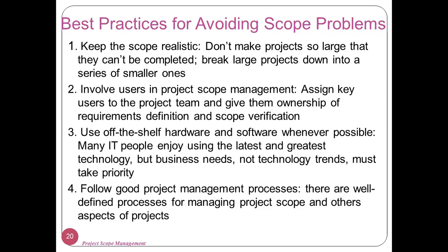What is scope verification? Scope verification is basically checking the difference between the actual and the proposed project. If the difference is minimum, that means you have achieved whatever requirements have been given so far. And if the difference is large, that means you didn't achieve what your end user wants. So involve end users in the process of gathering the requirements and also in the process of scope verification.